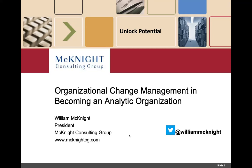What is the best way to figure out who the stakeholders are in these projects? I think the first few are going to be obvious — they're the people that are going to be actually using this the most, and that might actually be your first 25. I would start by looking at the users and go up the chain from there — their bosses, directors, VPs — and use your judgment to find your way by starting with the users.